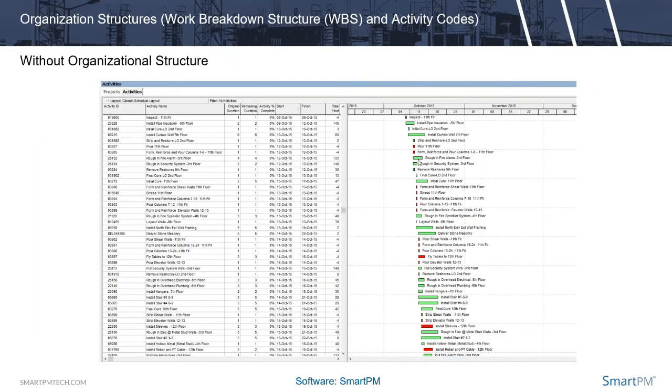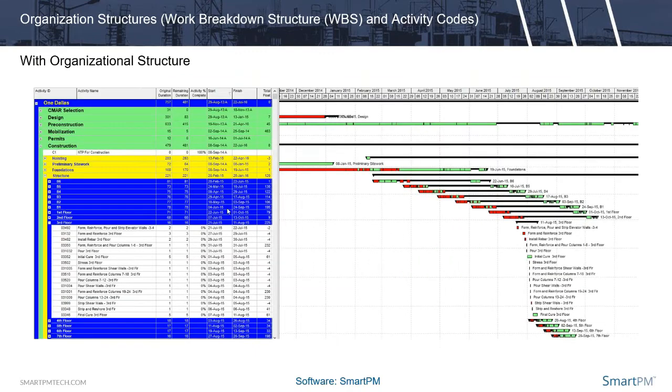Whereas if you just have this list of activities, which could be in the thousands, I've seen a 274,000 activity schedule before, it's just not going to make any sense. This is going to cause more confusion. So that is why these activity codes are there. If anybody on this call is ever involved in a project that doesn't exercise the work breakdown structure functionality or the activity codes, then it's going to be very difficult to comprehend the actual schedule in a manner that speaks to the trades, the construction team, the owners, and the architects. So that's why this is important.